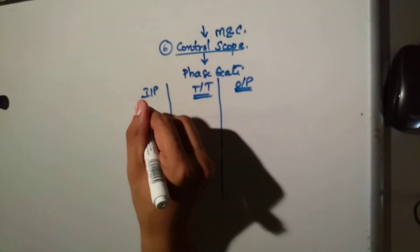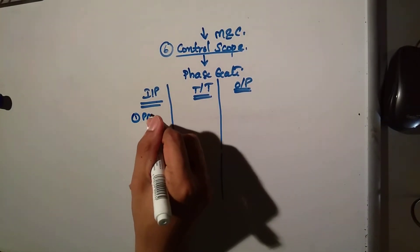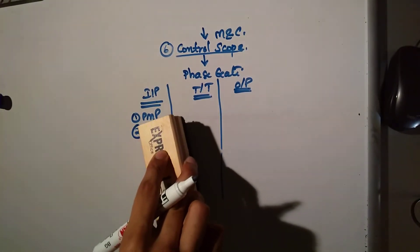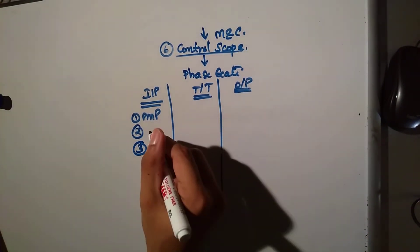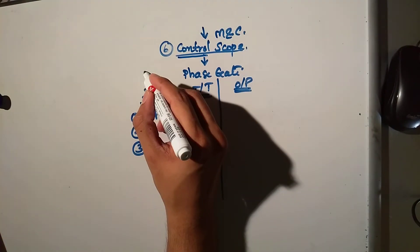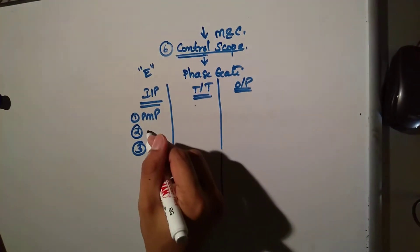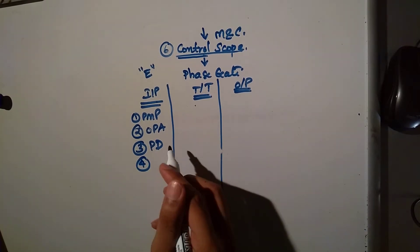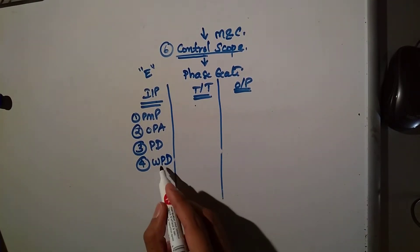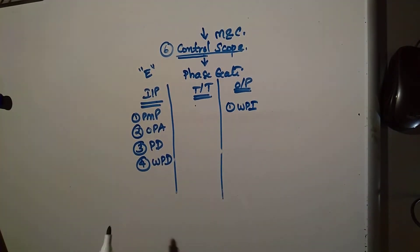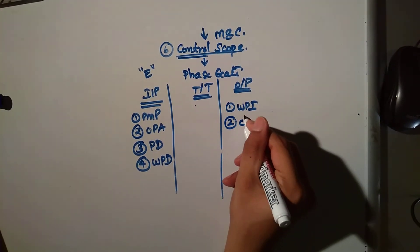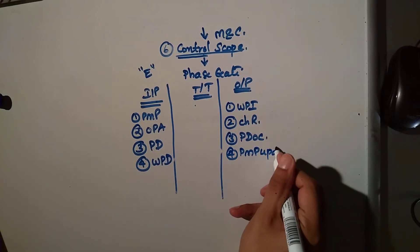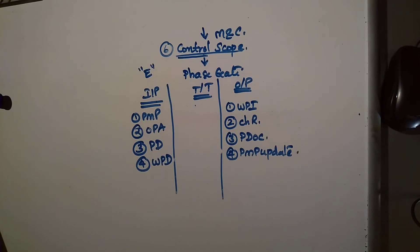We are comparing the project management plan — what we planned — with the work performance data, which is the deliverable output after execution. In this control process there is no expert judgment and no EEF. The inputs are project management plan, work performance data, OPA — organizational process assets — and project documents. Work performance data becomes work performance information. If not equal, you raise a change request, project document update, and project management plan update. The tool is data analysis.